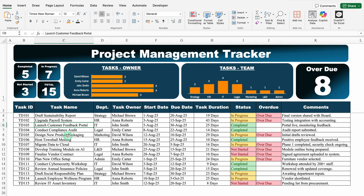In our data, we have got task ID, task name, department, task owner, start date, due date, total duration of task, status, overdue, and in the end we have got comments. Once the data will be updated here, the dashboard on top will get updated automatically.